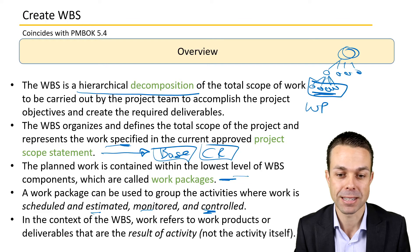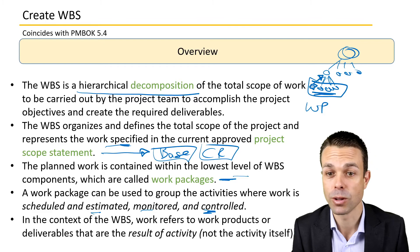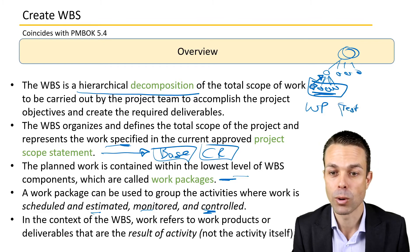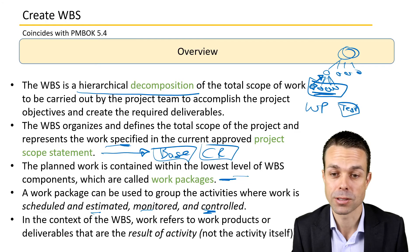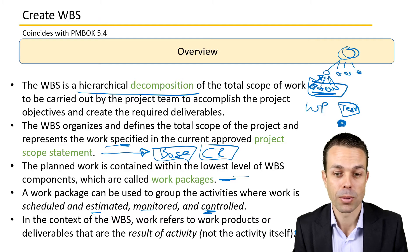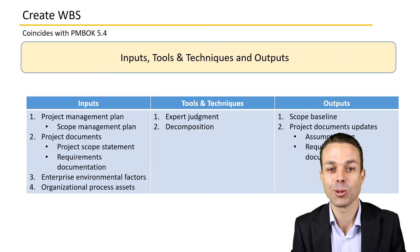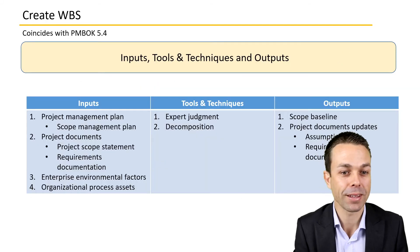In the context of the Work Breakdown Structure, the work refers to work products or deliverables that are the result of activity — not the activity itself. These might be pieces of a feature, so we're not saying we're testing, but rather what are we testing — this particular item that we're delivering. We'll have activities associated with that, but these are the work products or deliverables that are the result of that activity.